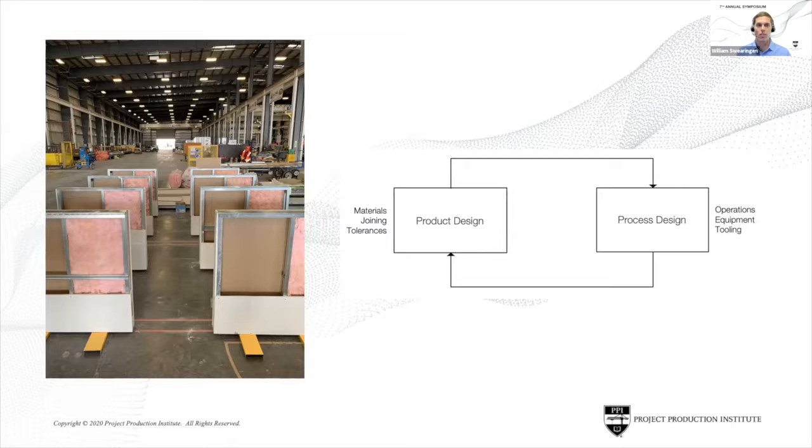I need 20,000 square feet a day for 14 months. So it's a different delivery model, and there's a lot of time and energy and resources invested into the supply chain to understand how we develop those relationships with our supply base. And also, if I'm not mistaken, one of the product configurations had certain components that you must procure from an external source, whereas in one configuration you were able to produce in-house and pre-punch all the holes to make the operation go a lot faster, correct?